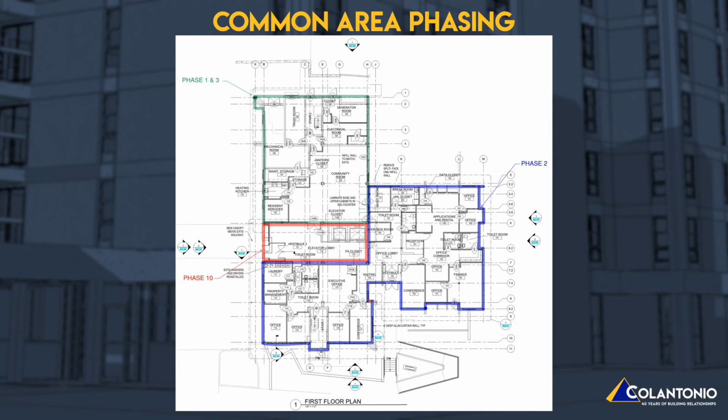Modifications will also need to be made to the existing HVAC system and fire-rated ceilings based on the new community room layout. Once that work is complete, we will move into the other half of the floor to renovate the office area. Lastly, in Phase 3, we will need to return to the Phase 1 area to finish out the remaining spaces. The elevator lobby and side entrance will be one of the last areas finished on this project in an attempt to prevent damage to finished products as construction materials move in and out of the building.